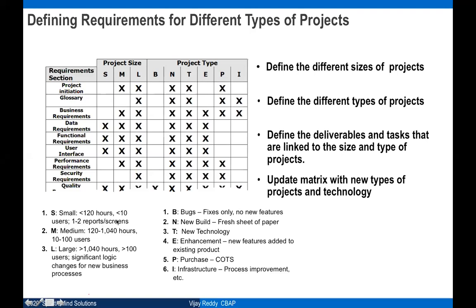Sometimes it's the number of users of the application, sometimes the number of screens, reports, or requirements in the project, the business logic you are using, or any new technology you are using. There is no one hard and fast rule like that. Estimation is always plus or minus 75%. Only 75% accurate.